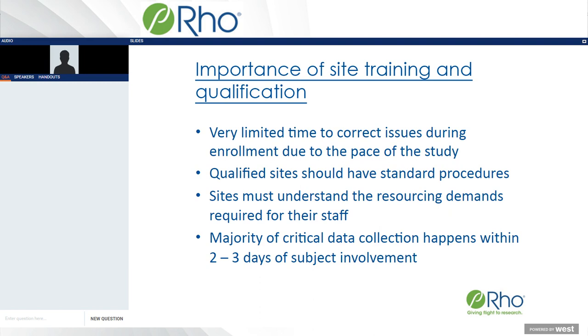on their staff. Also important along those lines is to provide clear instruction regarding the expected qualifications and certifications for their site staff, and providing that in advance during that planning stage before the SIV, so that you don't have somebody conducting a procedure that may not be qualified to conduct that procedure. You want to ensure that all of the staff working on your study are qualified to do so and qualified to be doing whatever piece it is that they are doing.